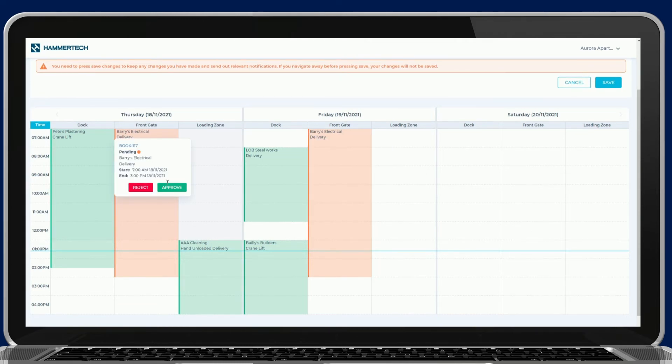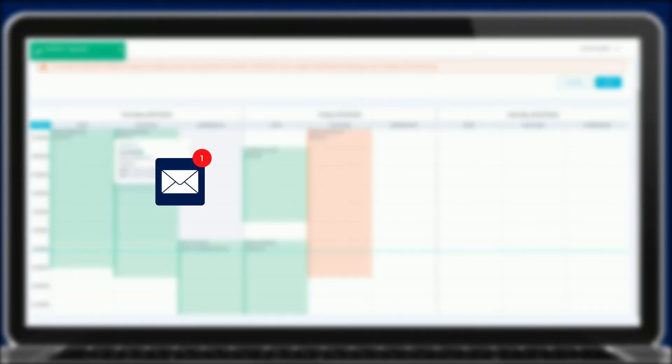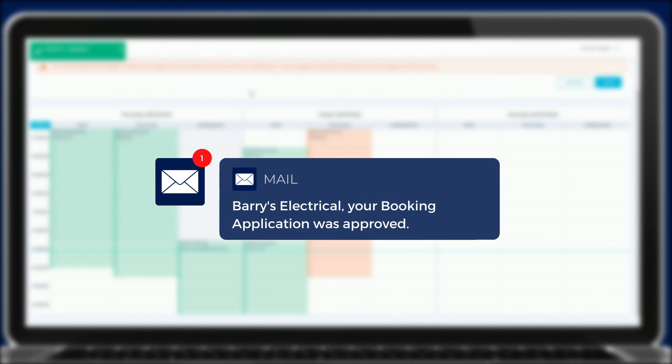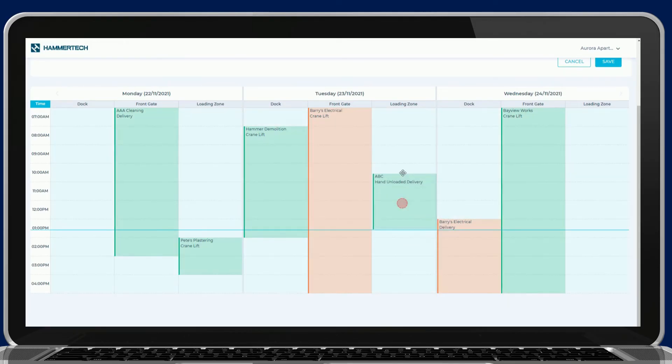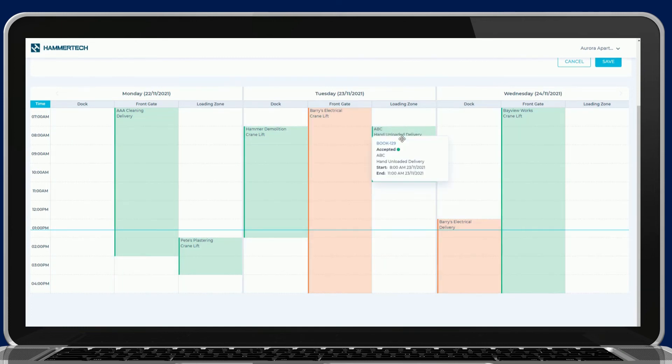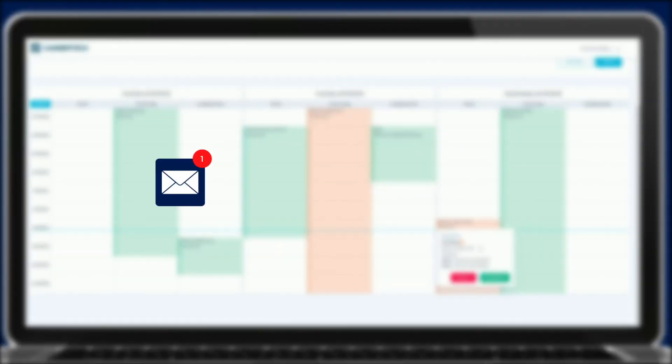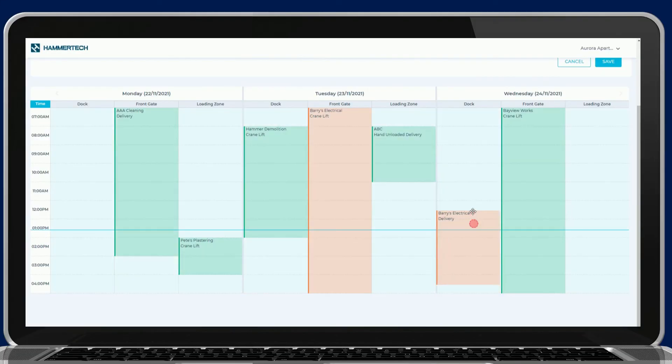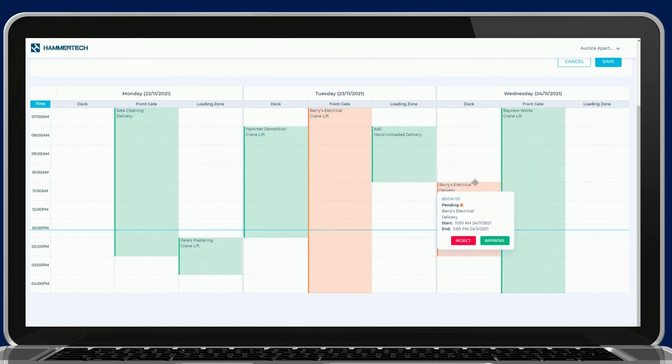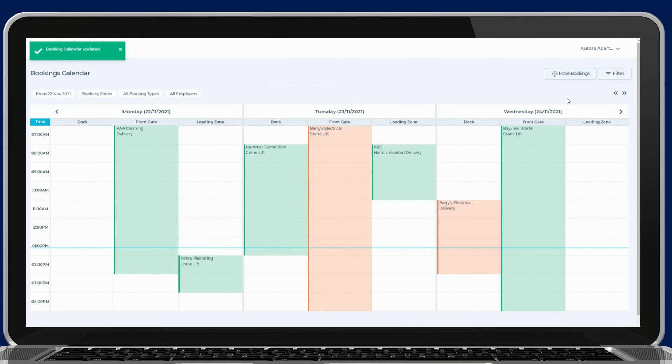Bookings submitted by subcontractors can be approved, rejected or edited by the main contractor. Drag or use the move bookings button to quickly update plans across sites. If a booking is moved, the subcontractor will receive notification of the change. If the subcontractor changes the booking, the request is re-sent to the main contractor for approval.